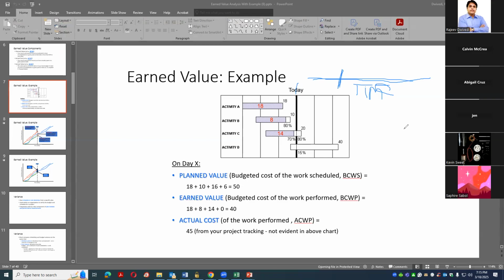Based on a document, what is the planned value by this day, how much work has to be done, what should be the value. So today, let's say by this time, 80% of work has to be completed as per plan. But actually, how much is done?